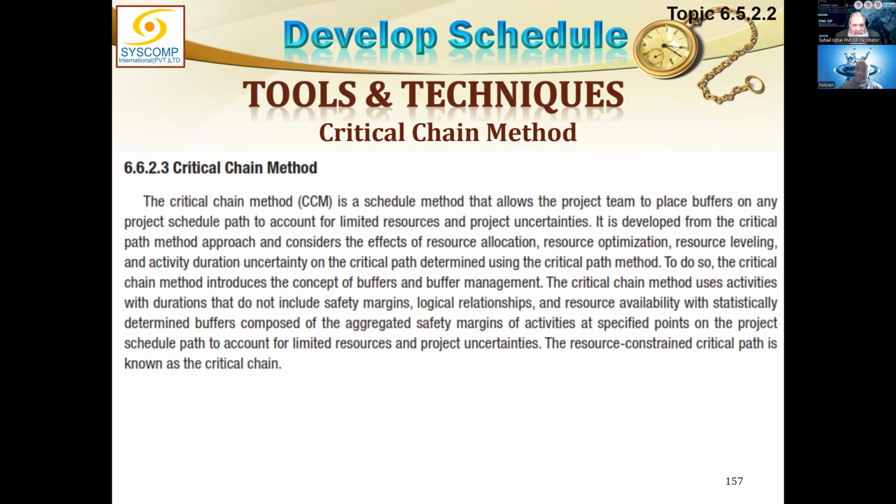Absolutely. Thank you. Now, as a project manager, you could resort to the critical chain method to put a check on that. I am not asking you to cut off the durations unnecessarily, but you must have some kind of statistical analysis specifically for your organization. What are the tendencies of padding in your organization?